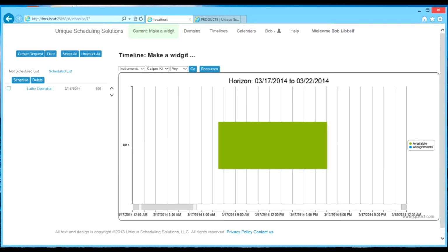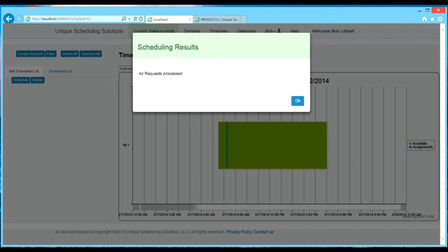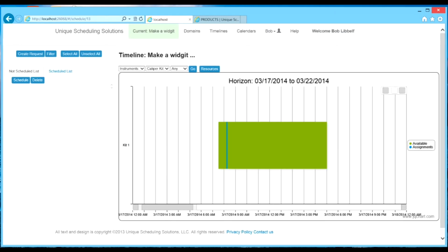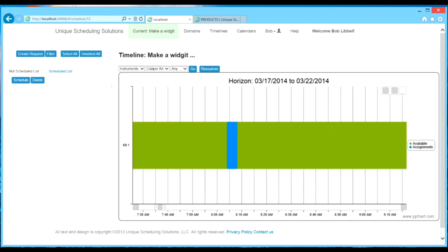But this level of detail is realistic because any one of these resources could have limited availability and could constrain the scheduling process. Note that we're including here what are sometimes called pooled resources, and we are allowing them to be used intermittently within an activity and in time-varying quantities.